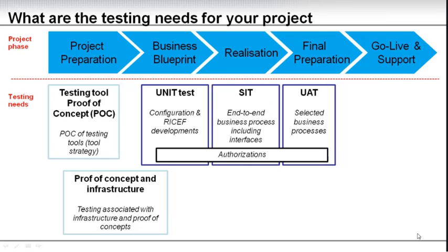And across these, you need to consider, what about authorizations? Where do I test my user authorization? And minimum, you should test it during your user acceptance test. Preferably, you will test it also during the unit testing and the system integration test. But it tends to be, it's a tedious task, and it tends to be on tight schedules that it is postponed to the very last minute.